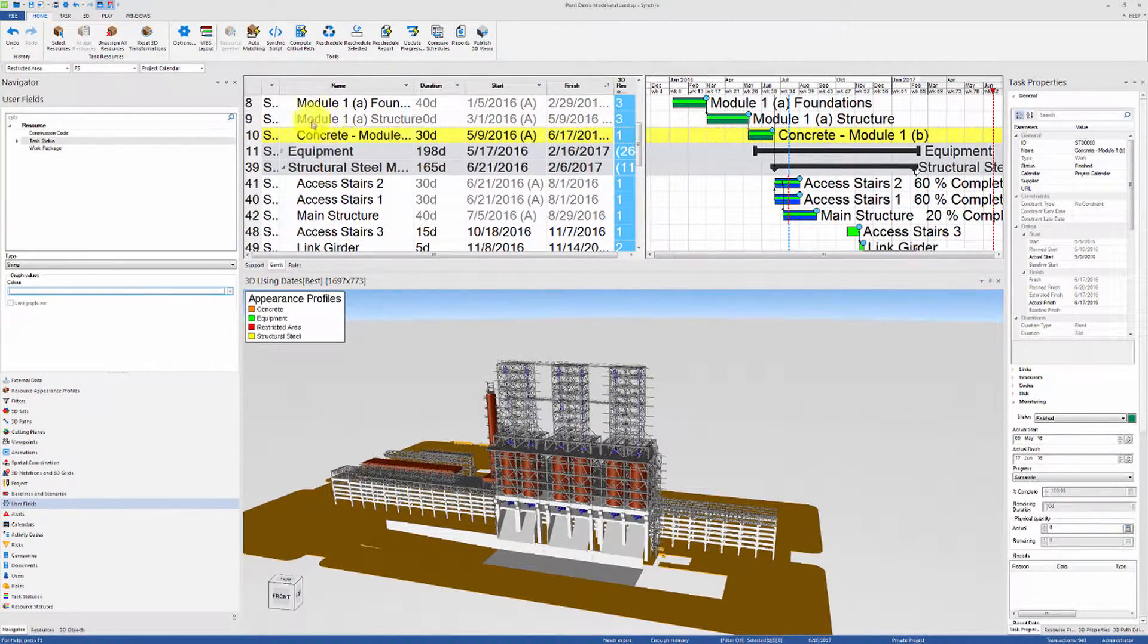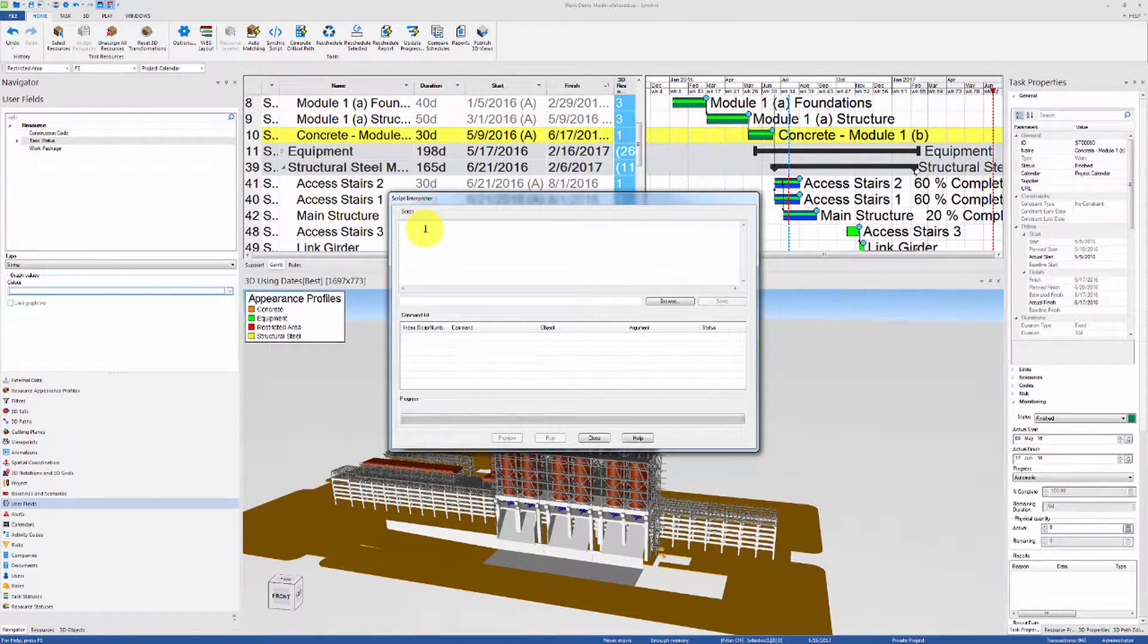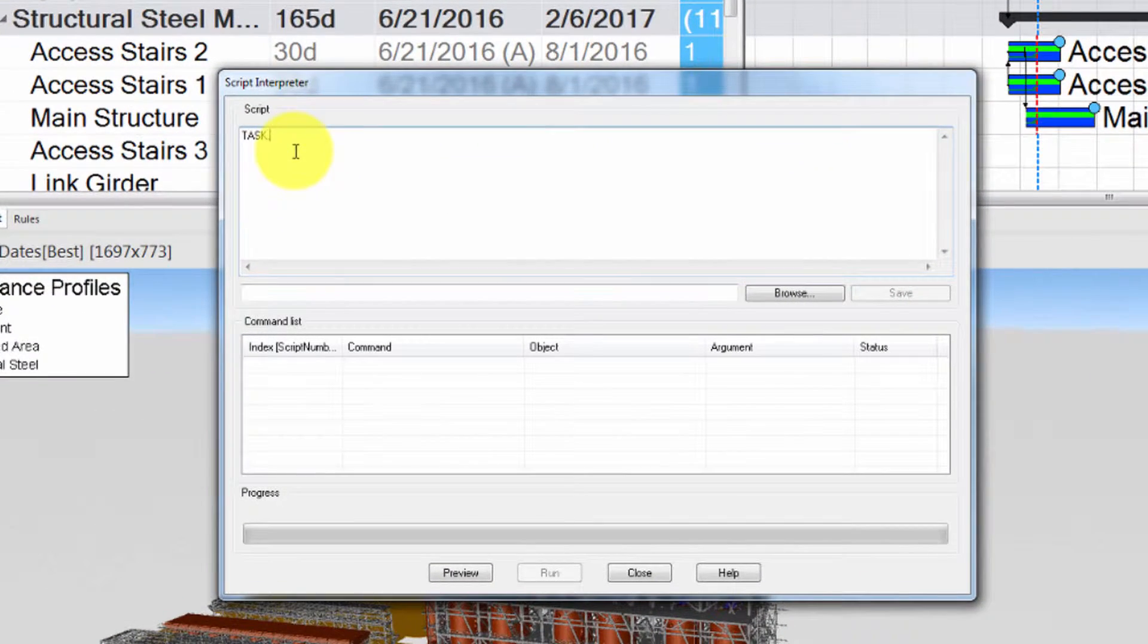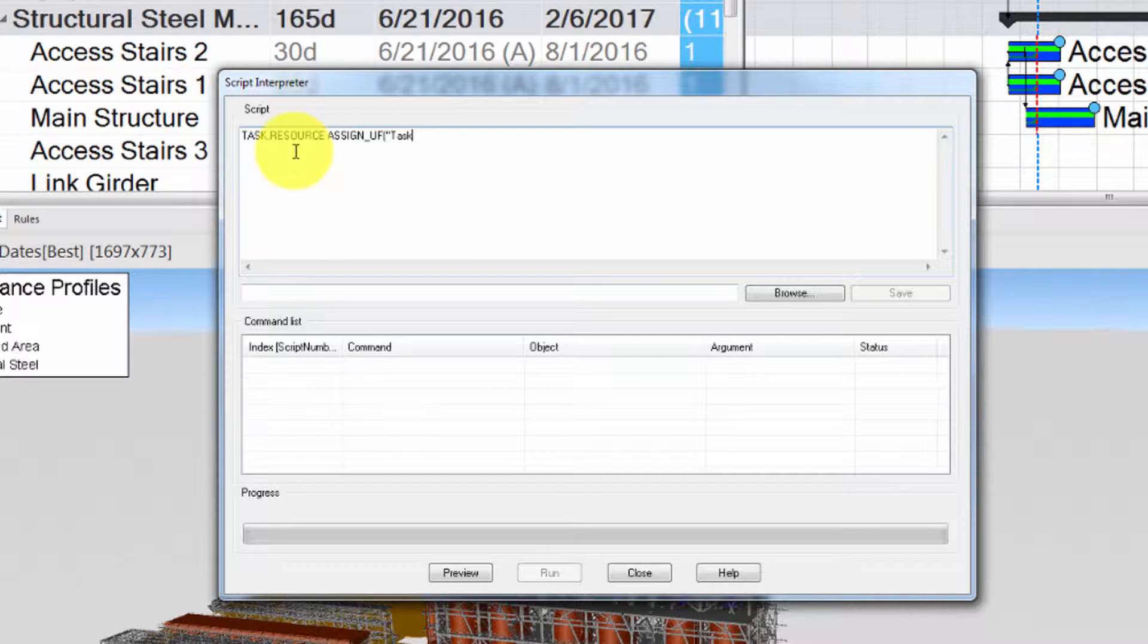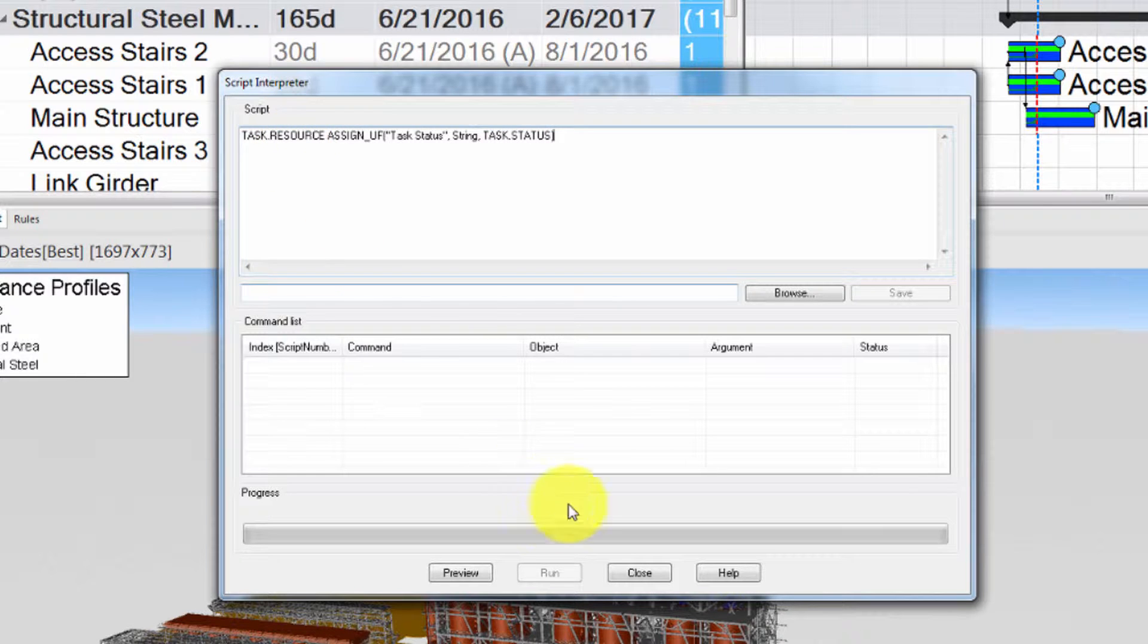Now we can load Synchro script and type the following code: task dot resource space assign underscore uf, the name of the user field, the type of the user field, and then the value we wish to assign, which is task dot status in this case.